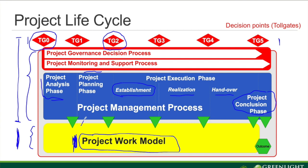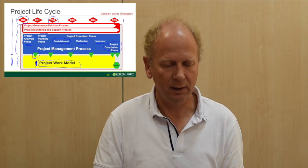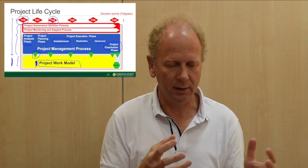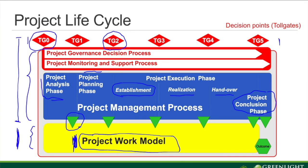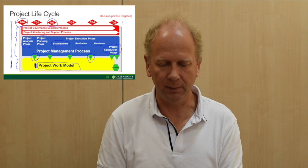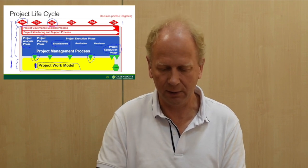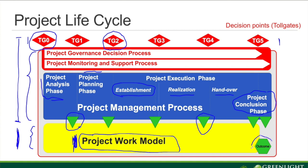We can see the close connection between the blue part and the yellow part — we have milestones, represented by these green triangles. To go from one phase to another we need to have completed something — for example, an analysis report when completing the project analysis phase. When we start to deliver, it could be many deliveries. Most projects nowadays deliver more than once, so we could have several delivery milestones, and we need to fulfill a number of internal requirements to ensure the delivery is good enough.